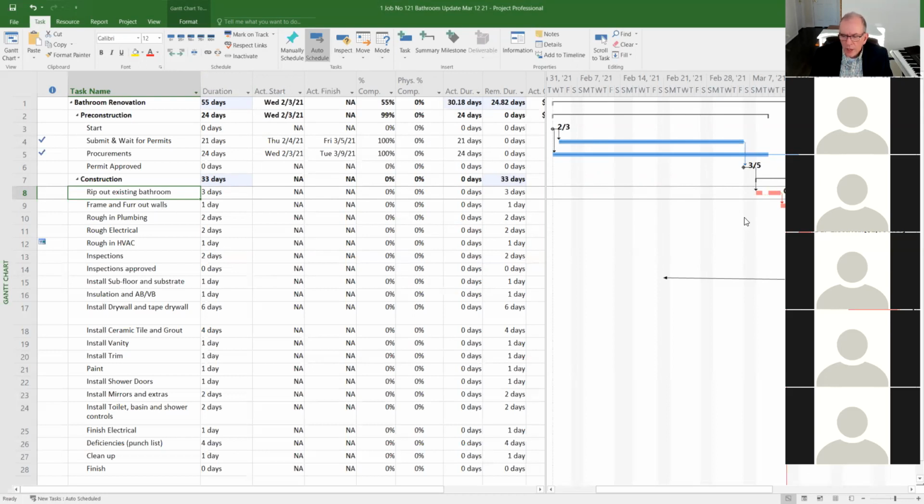Well, in construction, unfortunately, this stuff happens too. The carpenters show up one day and then they're away a day. They're somewhere else. I don't know where they are, but they're somewhere else. If there are people, we know because we put them somewhere else. In this case, there are people. But if it was a subcontractor, those of you who've worked in construction, have you ever had that happen? A trade shows up, they're there 2 days, and then all of a sudden they disappear 2 days, right? Happens. So if you want to illustrate that, you could just split it.